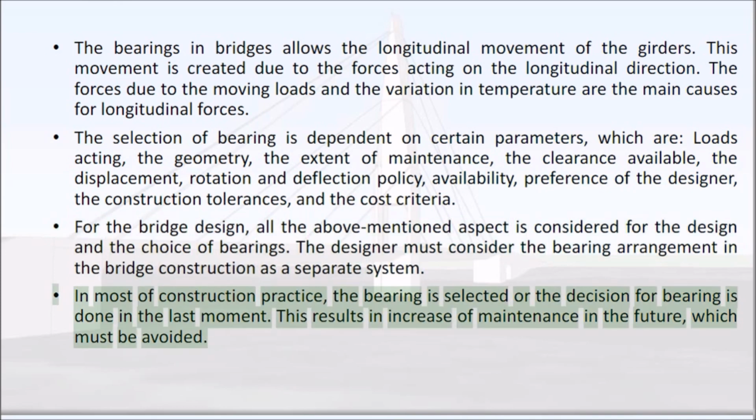In most construction practice, the bearing is selected, or the decision for the bearing is made, at the last moment. This results in an increase of maintenance in the future, which must be avoided.